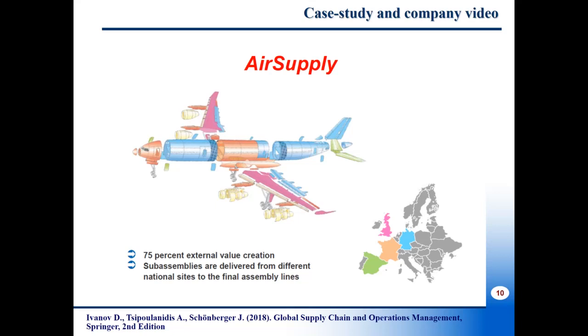The task is made even more complex by the generous length of time Airbus gives its customers to submit their final wishes, including lead time. Manufacturing takes around 2 years, and Airbus accepts customer change requests up to as late as 6 months before delivery. The challenge in the aerospace industry is that, due to highly customized manufacturing of an aircraft, collaboration with suppliers begins only a few months after the order has been received.